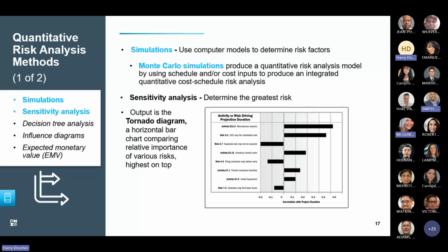It depends on what budget it's taken from. My experience with AT&T is there are some efforts that can be capitalized, some efforts that can't. The planning is considered overhead. So that would come out of a general budget. Once things get kicked off, past your kickoff meeting, at least most of the rest of the work can be capitalized. That's where you need to work with your finance people and determine which budgets the money is going to be coming out of.